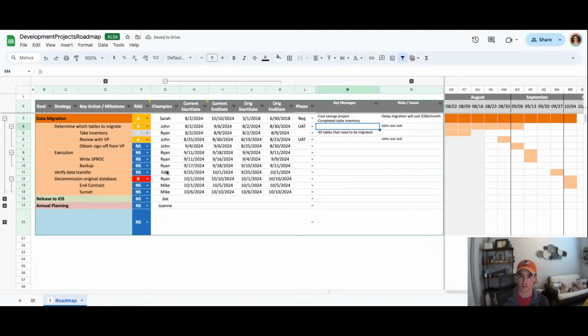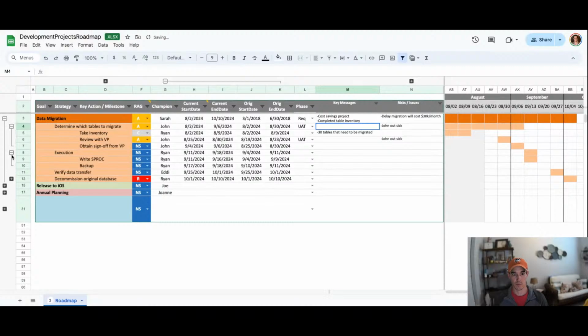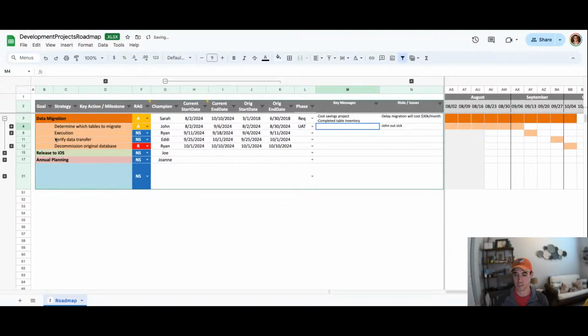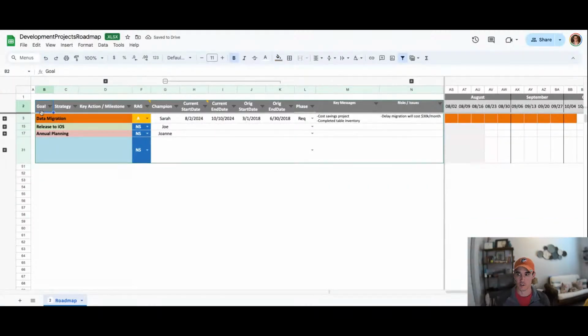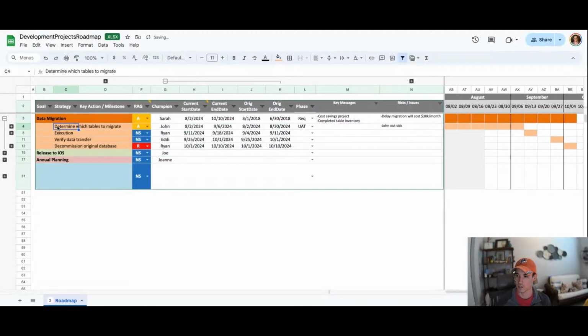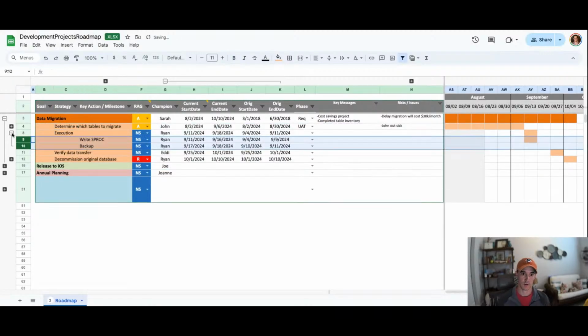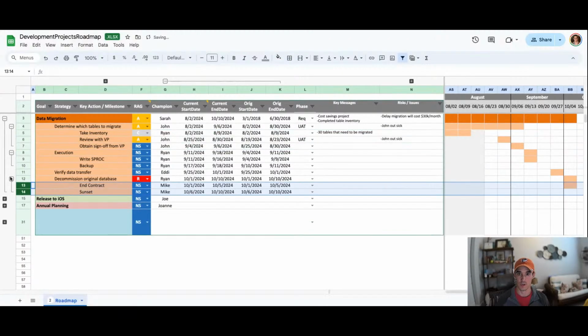We can see this Gantt chart that's dynamically updating. We can see this gray bar moving across as we move through the calendar and see where an activity should have been started already. Is it about to start? Is it past due? And then it's as simple as just recollapsing these to get a different snapshot depending on who you're talking to. Maybe I just want to talk to an exec at a steering committee meeting, and I can just screenshot this and shoot that off. It works really well to summarize succinctly what's going on in a project, where things are going well, where they're not going well, and it's all for free in Google Sheets.